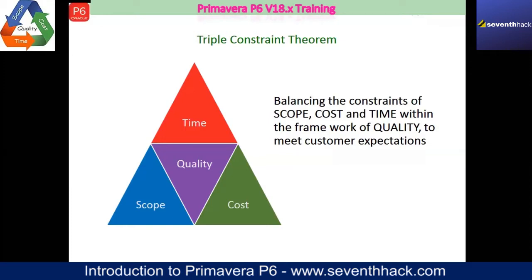So you should create a first level WBS in Primavera and check that out. And then you say, okay, yes, because if the objective is bigger, then you have to tell the client upfront if you can give me more time. If the client says, look, I don't have much more time than this, then what should you be doing? You should be negotiating with the client and trying to identify which are the high priority features that will fit within the given time constraint. So that's a very good business practice, so that you can meet the expectation.